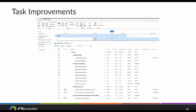Task lists have gotten a lot of improvements — really a big rewrite. You can now complete a task just by checking the checkbox on the far left column, which marks the status complete and crosses it out. If tasks are past due, they're automatically colored red. You can also create sub-tasks indented from a parent by using indent or outdent in the ribbon. You get really robust functionality that looks very similar to the Microsoft Project interface.